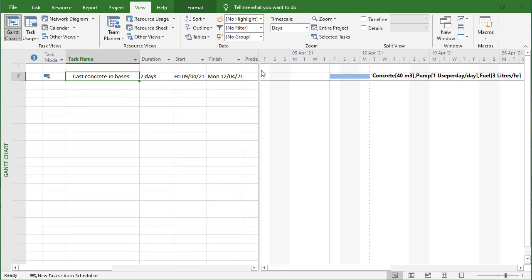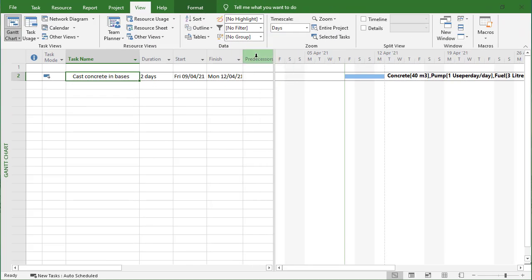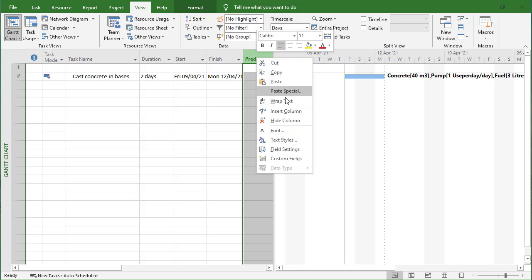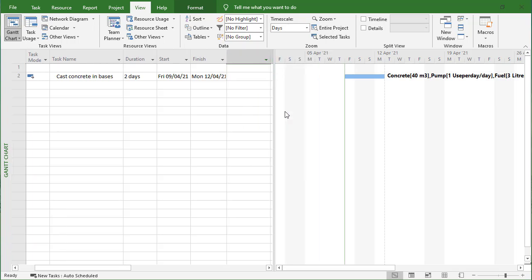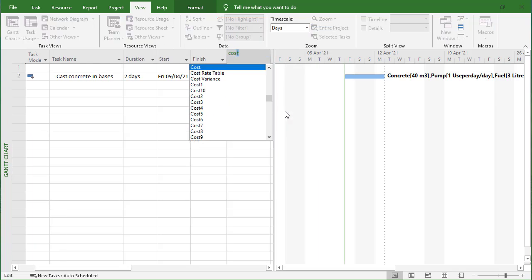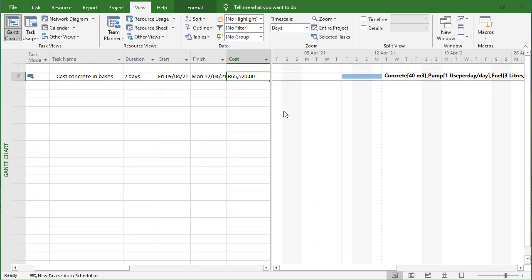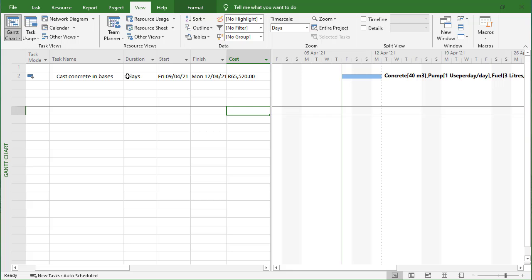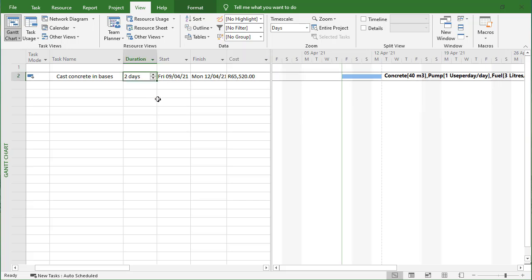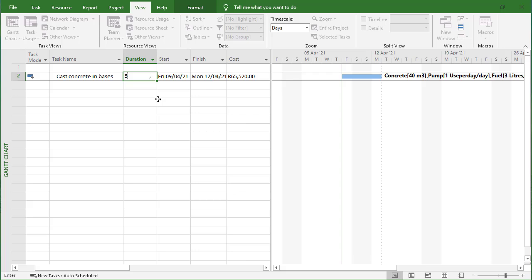The cost for the casting will be 65,000, of which the bulk will be the concrete material, but then the pump will be a portion of that and the fuel as well. As we change this now - let's change it to five days - the concrete material cost will stay the same but the variable cost in terms of fuel and the pump will increase.